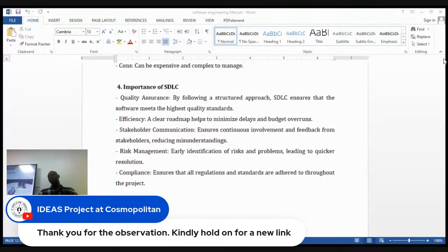A software that will take you like 3 months. But there are software that are also as small as take only 2 weeks. So you consider it, if you are taking 10,000 a day, 4 of you is 40,000, and it's taking 2 weeks. 40 times 14. So that's about what you charge, 280. So that's what determines how much you will charge.